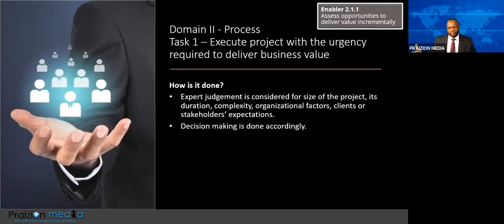Think about it. How? Now, there might be some shortcuts to get certain stories done quicker than others. And that's what you need to be thinking of. Even if you're not working on an Agile project, you should ask, how do we get business value to our clients? Well, maybe we can release the 50th floor first and we can get people to begin to work out of there while the other floors are being kitted, while the other floors are being worked on, while the minor work is ongoing.